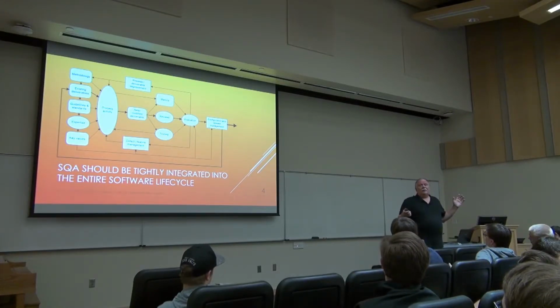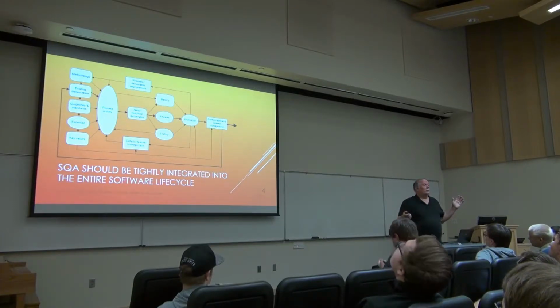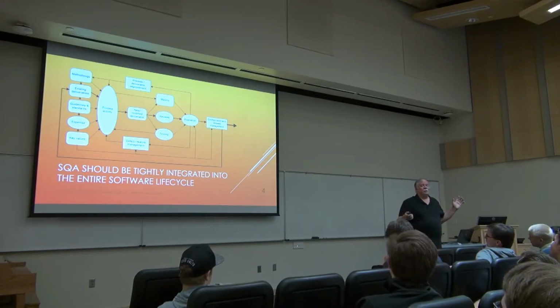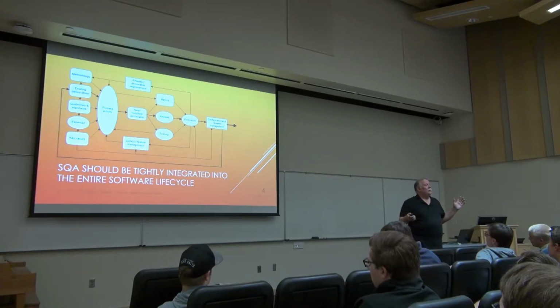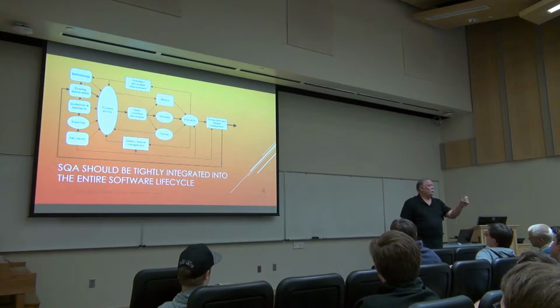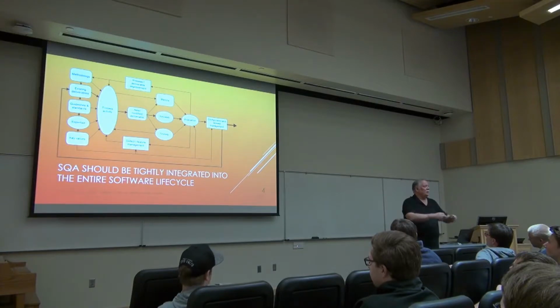And they had no configuration management. Updates and changes were all being sent around by email from different parts of the globe. There was no way to say, here is a snapshot of what it is as of this date. All you could do was scan through emails and gather files and try to make sure they were actually compatible with each other.